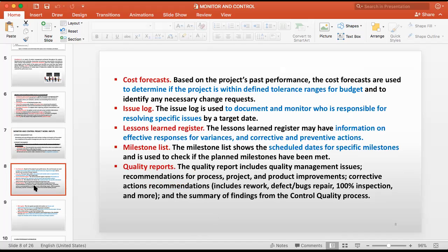For this work, this much you are going to spend, because in that project we did a similar thing. If we did that 10 years back, then for this year our cost forecast is that one plus 20% escalation, because the money value changes. So we can forecast like that.